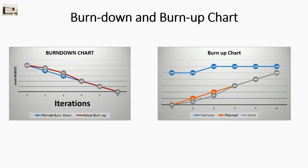Both burn up charts and burn down charts can be used on projects. There is no need to adhere to using only one. Burn up charts make more sense when focused on work across iterations while progress within a single sprint or iteration is often tracked with a simpler burn down chart.